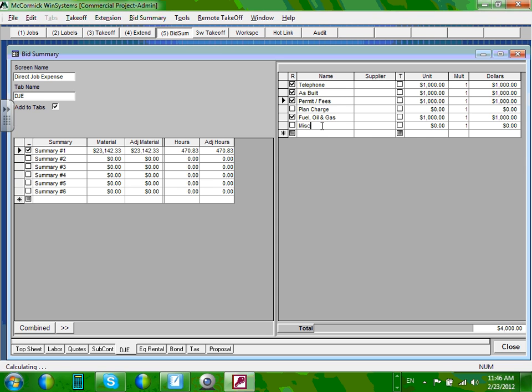One thing: instead of miscellaneous or plan change, can you go to plan change and change this one to electrical power? You need to pay the power service. For electrical power, let's do 2 grand. So that project is going to last that amount of time, and we have to pay $2,000 for the trailer when we're powering it, right?